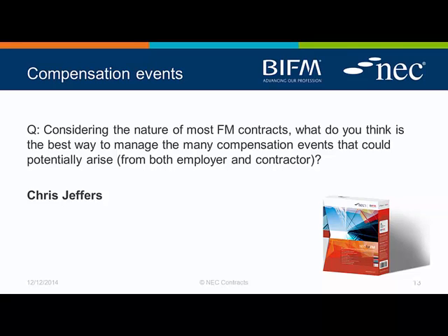So at that point where you have so much uncertainty, so much risk, then if you absolutely have to press the button now to go, maybe cost reimbursable is the only logical and sensible way forward. If you can wait those few weeks and bottom things out, then you're reducing the risk and uncertainty, and therefore maybe the lump sum, schedule of rates, target cost comes into play. That's right. Yeah, the risk register really does play its part.